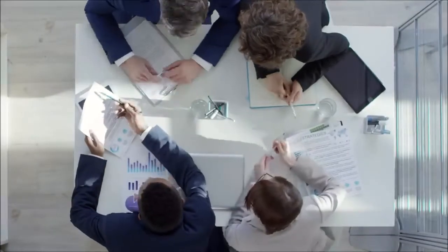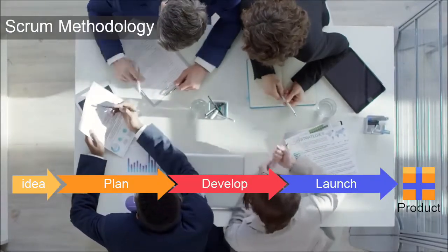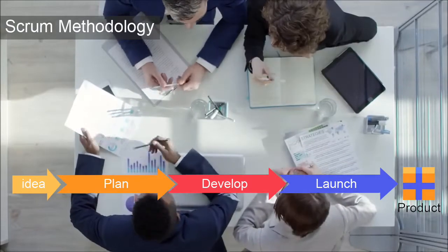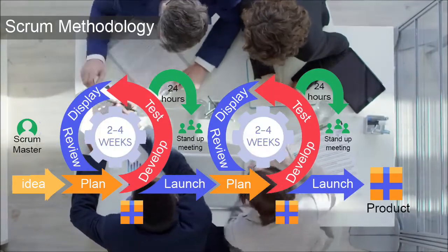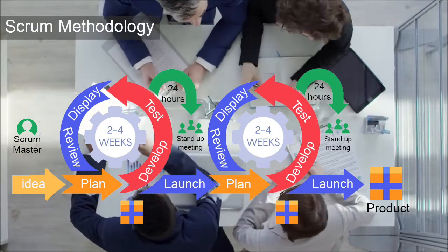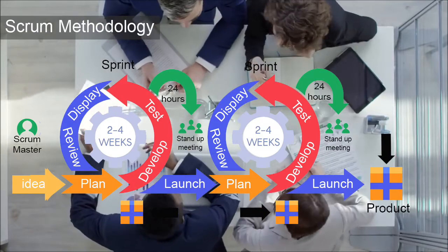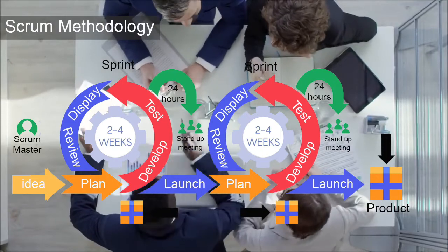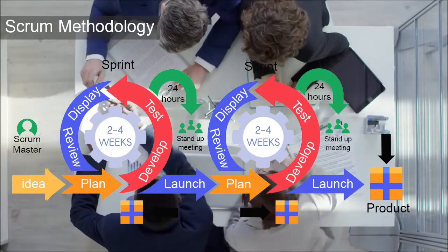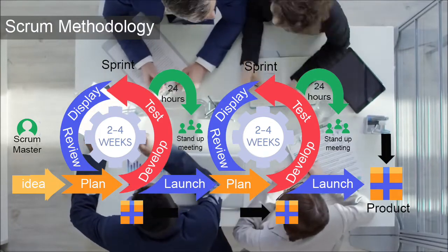Scrum methodology. Scrum framework is a project management system that relies on incremental development. The larger project is broken down into shorter mini-projects called sprints, which last for 2 to 4 weeks and have their own product outcome. Each repeated cycle of the process, or iteration, aims to build upon each sprint so as to focus on the most important features first and come out with potentially deliverable products at the closure of the project or at the end of each sprint.